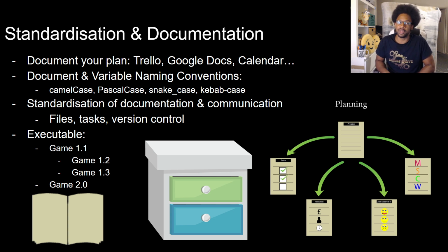So I usually have, say, a stand-up like every Friday, and I'll put the things that I need to cover in that stand-up as a reoccurring meeting. So if we don't cover something, it will stay there for the next meeting. And if we do cover it, I can delete it and it will update every future meeting, so it will no longer be there. It works in a very similar way that task boards do. So calendars are a useful tool for just kind of organizing your time.